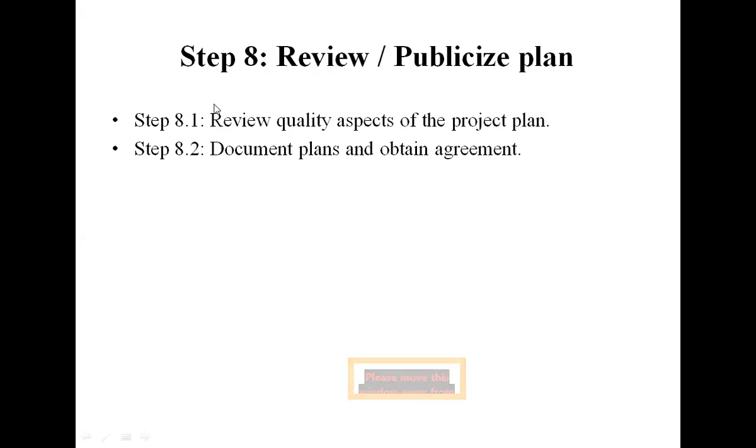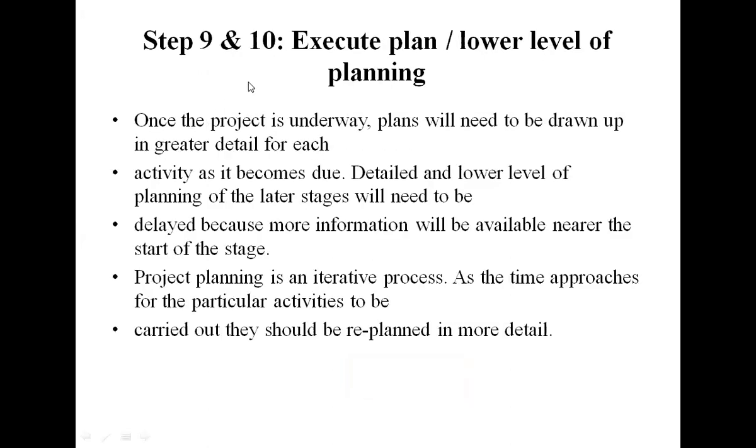Okay. Next go for step 9 and step 10. Step 9 is execute plan and step 10 is lower level of planning. Once the project is underway, plans will need to be drawn up in great detail for each activity as it becomes due. Detailed lower level planning of the latter stages will need to be delayed because more information will be available only near the start of those stages.